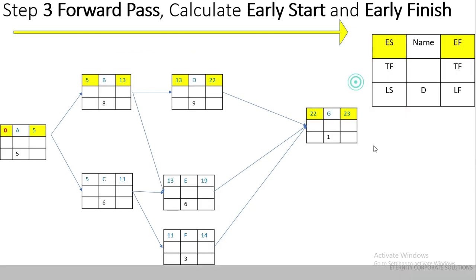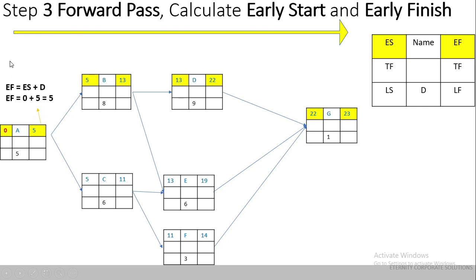In Step 3 we calculate the forward pass. The forward pass is used to calculate the early start and early finish of each activity, going from left to right. The first activity in the network is Activity A, and by convention we take the early start as zero — this is also known as the end-of-day convention in project management. The formula is: Early Finish = Early Start + Duration. So for Activity A: 0 + 5 = 5.